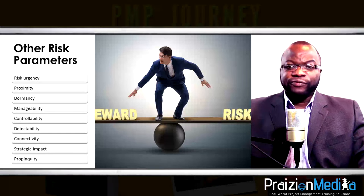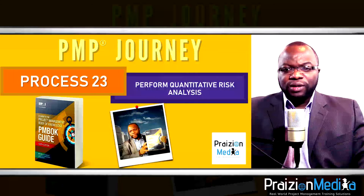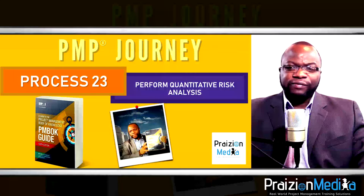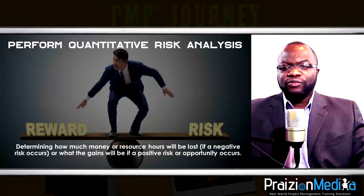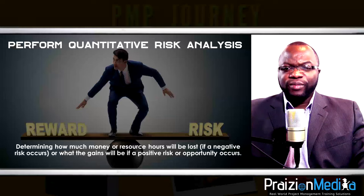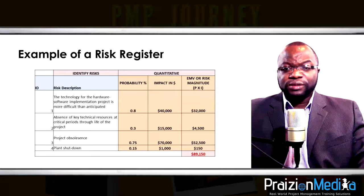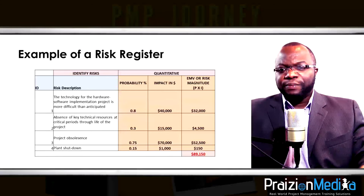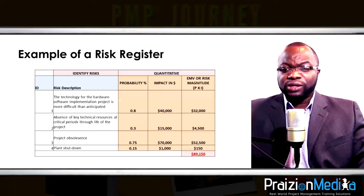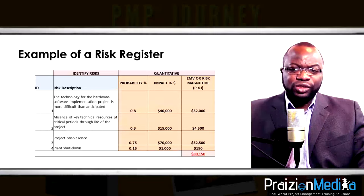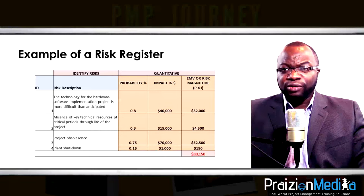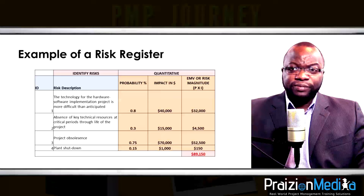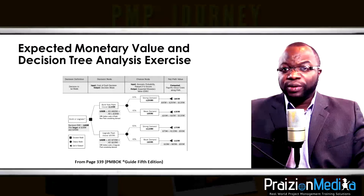Process 23: Perform quantitative risk analysis. This is where you quantitatively analyze risk from a dollar or resource-hour perspective. Typically it's probability times impact — probability as a best guess or expert judgment — times the dollar impact, giving you the risk magnitude or expected monetary value (EMV). EMV equals risk probability times risk impact.